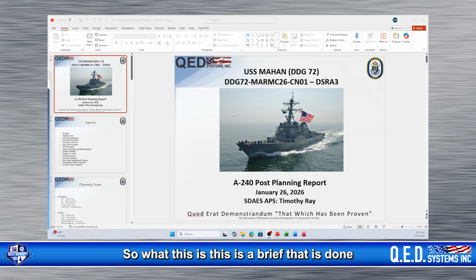This is a brief that is done after solicitation has finished. Typically it's at A-240. So once the government says they are done soliciting bids, you should start drafting this brief. Typically we like to present this to the maintenance team 14 days after solicitation is finished.